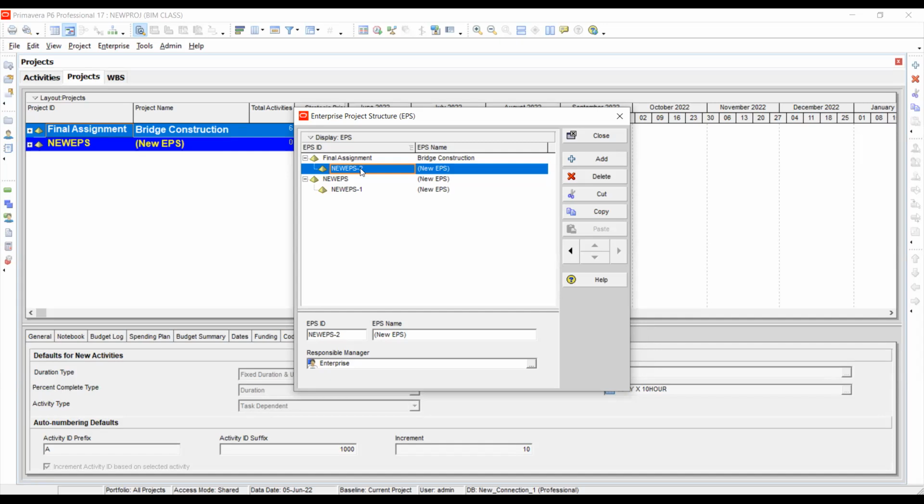But the employer, or the boss of the project, or the contractor working in the head office, they need the overall budget also. They need the overall program and the overall duration of the project. They don't need the zone wise details. They need the overall project. That's why I'm saying that in Primavera we can divide zone-wise sub-programs and link everything to the main program, so we can easily handle each program separately.